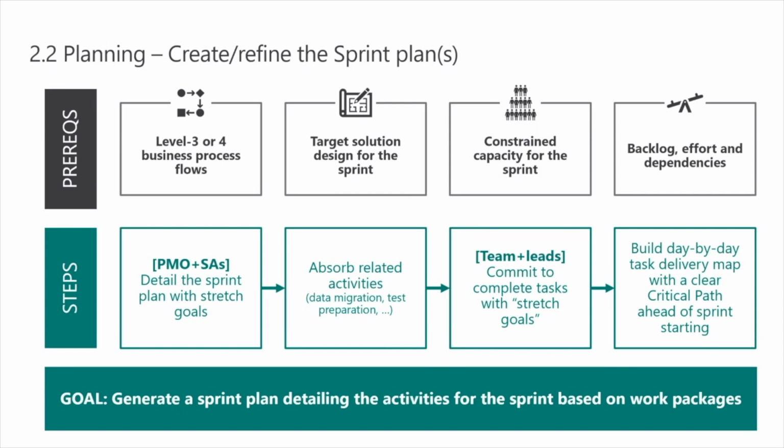You make sure that the total effort is decrementing in the right way. So you're not building up a big backlog. You're not creating a technical debt. Within the sprint plan, you are planning all the related activities as part of that sprint plan: the data migration activities, any test preparation activities, security activities, etc. So what you're not doing is handing off the data migration planning to a separate technical team that just go off and do their own thing in a silo, right?